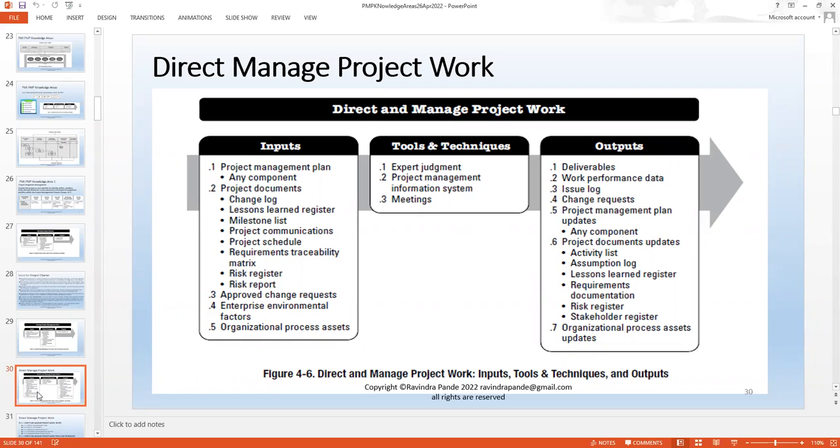Time and material, in the sense that you can add resources and charge the client as per the resource gets added. So Ravindra, for Wednesday, Thursday, Friday, allocated at so and so rate, charged to the client in the billing period, and so on and so forth.